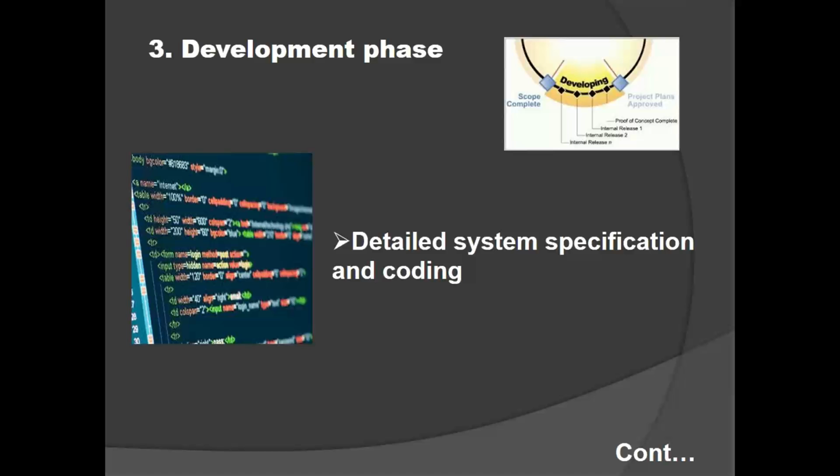In case he finds there is a delay in the project, then the next day the project manager will ask the BA to arrange a meeting with the developers. Then the BA will arrange a meeting. Then the project manager will ask the developers why the project is getting delayed, whether they have understood the requirements or not, and whether they want some more resources to be added in this project, or whether they are going to do some extra work, whatever it takes, taking all precautionary measures to ensure that the project is not going into scope creep.